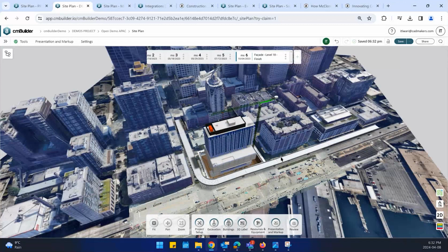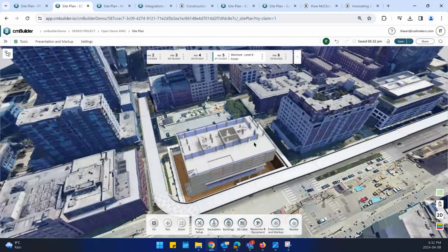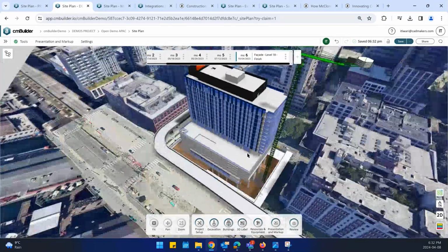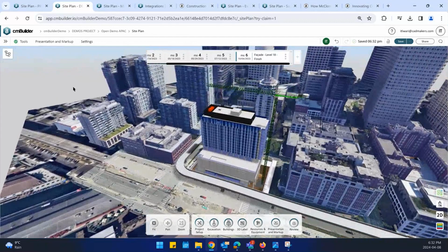So to sum it up, if you notice, what we have done so far, we just have a quick sequence over here. So it's starting from scratch. So we're using milestones. We're using your drawings, your 3D models to sequence these different stages. You're placing resources. You're defining the dates to those resources over here, and more or less, the only thing remaining now is about, okay, how do you consume and how do you share the work that you're creating, that you're preparing your logistics plan? How do you prepare that, the output, the final presentation?